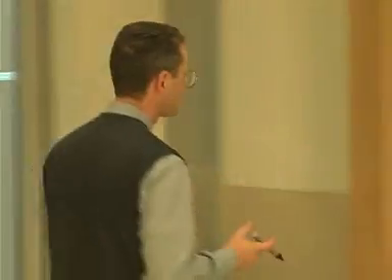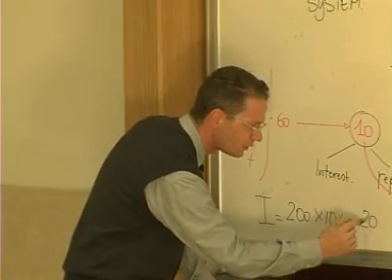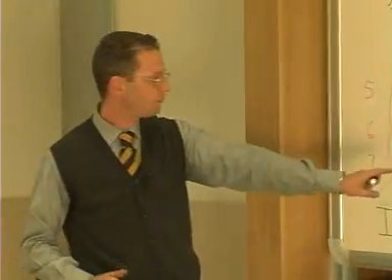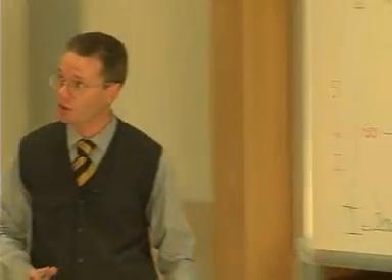The value of interest is basically 10% of, in this case, 200 times 10% is 20. In this case, paradoxically, this amount of 10 is used only to repay a part of the interest on the value-added tax. And so, no principal repayment is done, and the remaining part of interest will be paid by using all the remaining amount of funds that is provided by the special purpose vehicle.